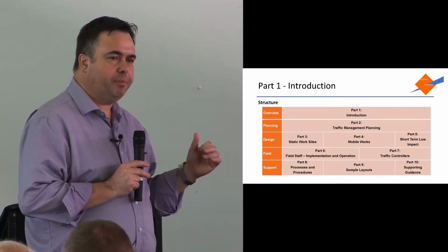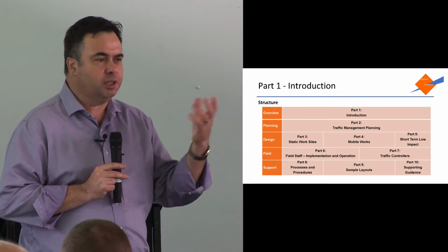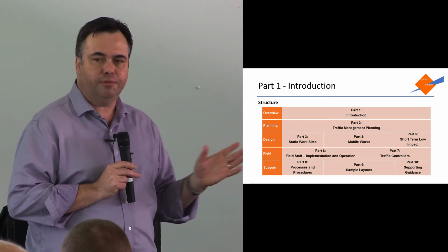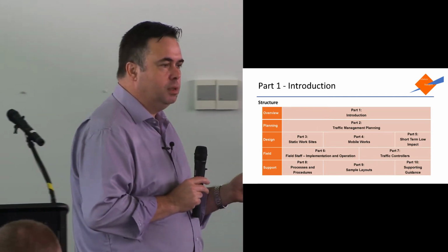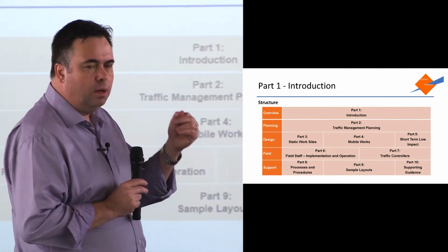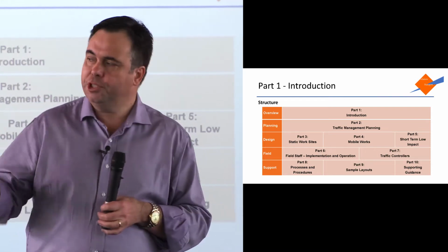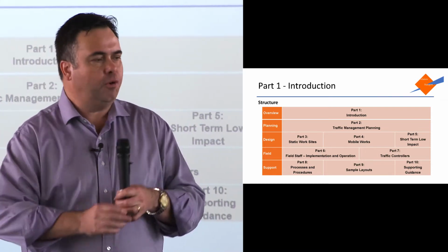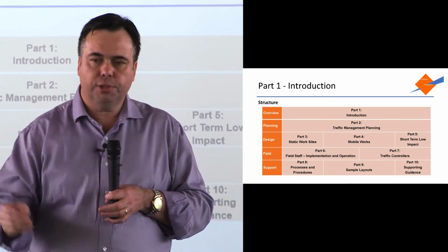Now, I know a lot of people use the terms traffic management plan and traffic guidance scheme interchangeably. Oh, they're the same thing, aren't they? No, they are different. The traffic management plan is planning the job. This is where, and I'll take you through a lot more in part 2, you work out what you are going to do with traffic before you start doing all the effort drawing up all the diagrams. Just little sketch diagrams.